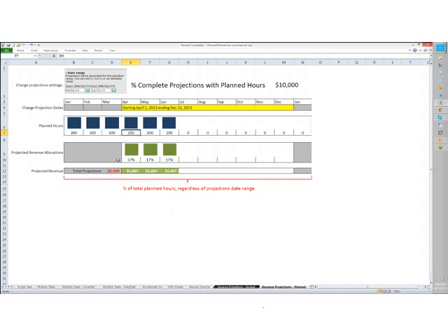This is where things can start getting really weird, because let's say your project looks like this. You set up the project in January. You didn't pay much attention to the dates at that time because they weren't important for whatever reason. And then the assigned hours trailed off. Now you're in April. You're starting to run your forecast, and you're saying, wait a minute. This is a $10,000 project. Why am I only forecasting $909? That's wrong. OpenAir is broken. It's not broken. That's just how it works. You're not looking at the hours before April, even though they're there. Very, very different than how bookings projections work.